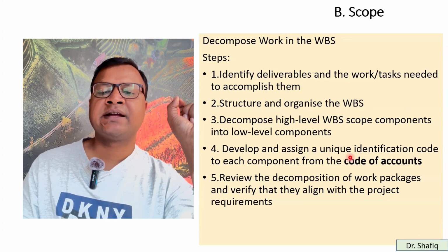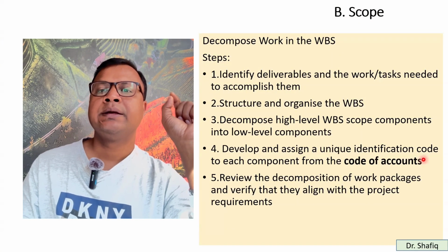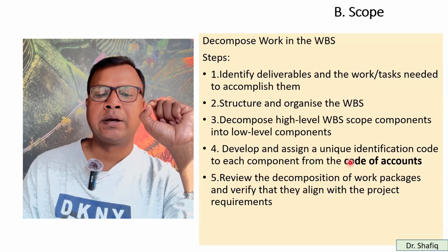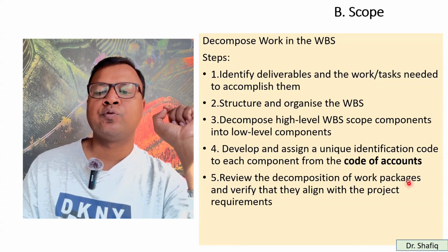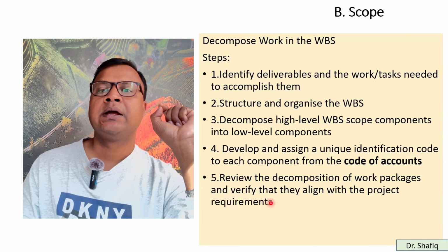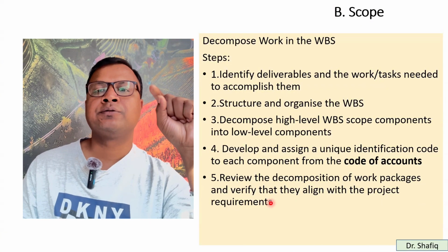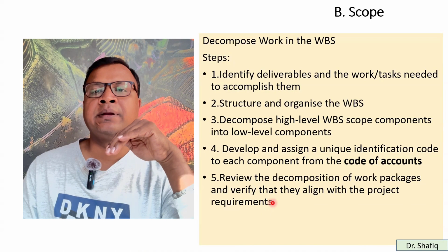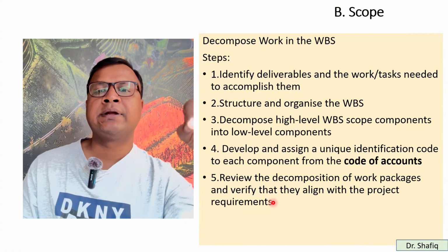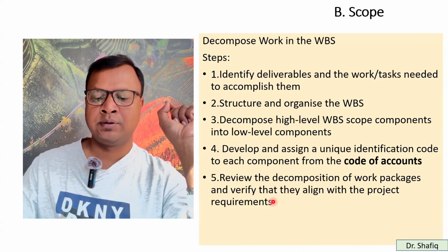Then develop and assign a unique identification code to each component from the code of accounts. You can put a code number for each breakup of the work, and review the decomposition of work packages and verify that they align with the project requirements. So all the decomposition you have to check one by one, whether they are in a hierarchical manner, whether they are in sequential order, and whether they are covering what we actually require for the product making or project implementation.